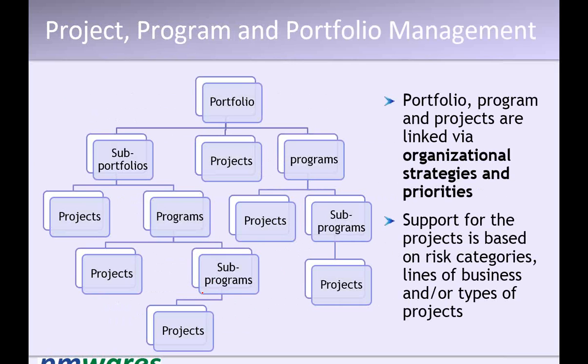If the client tomorrow says start another project, for this group it becomes much easier because you need not learn about the client, you already know it. With the same technology and the same technical skills, you can share resources among these projects. So the objective of the program is to bring projects together for more efficient execution.